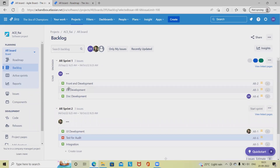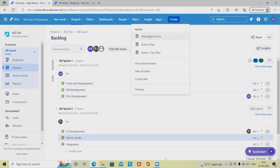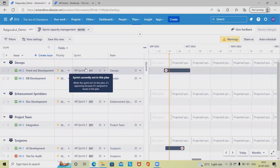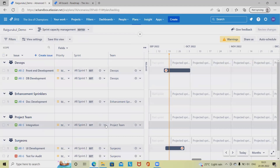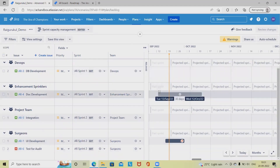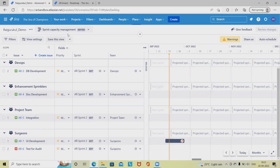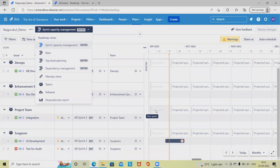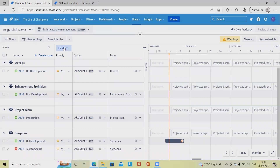These backlog items are added into the sprints. Let's go back to the plan again. Now we can see the sprints available. This is how we can make our effective capacity planning and see the detail structure of how our teams are utilized. If anyone is under-utilized, we can also correct it.